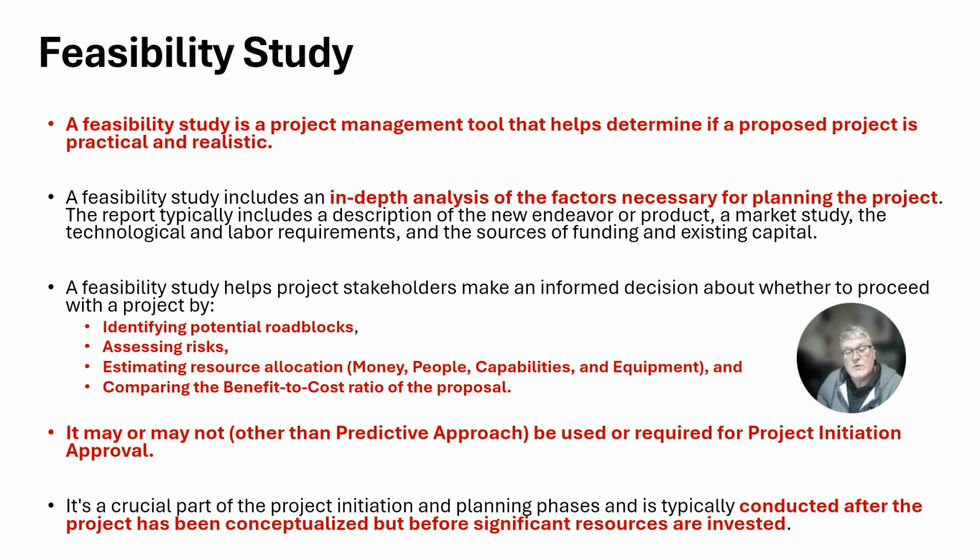It assesses risks. It estimates resources and resource allocation, including the money that's going to be needed to do the project, the people involved, the capabilities of the people involved with the project, and equipment. It also provides typically a cost to benefit ratio, whether that's ROI or NPV.